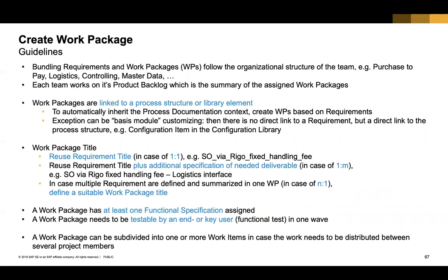Then we also have the work package tile and how to manage work packages. I will show that in the demo as well, for you to track your own work packages. But the creation of the work packages typically happens from the requirements management app, where you search for requirements based on various criteria, pick one or more of them, and then start to create work packages. That's the starting point to create work packages. Yeah? And I will show that in the demo as well.